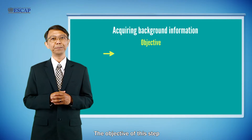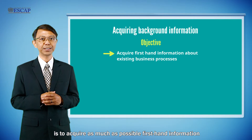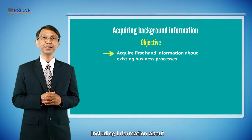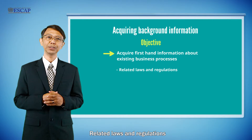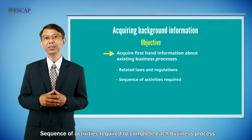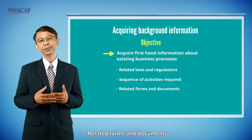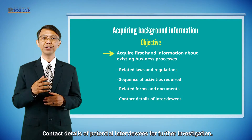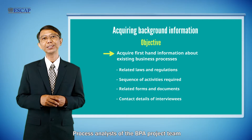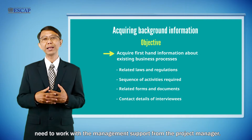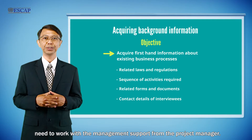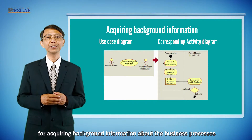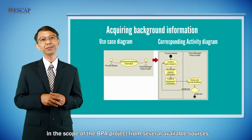The objective of step 1 is to acquire as much as possible first-hand information about existing business processes in the scope of our analysis, including information about related laws and regulations, sequence of activities required to complete each business process, related forms and documents, and contact details of potential interviewees for further investigation. Process analysts of the BPA project team need to work with management support from the project manager to conduct this research from several available sources.